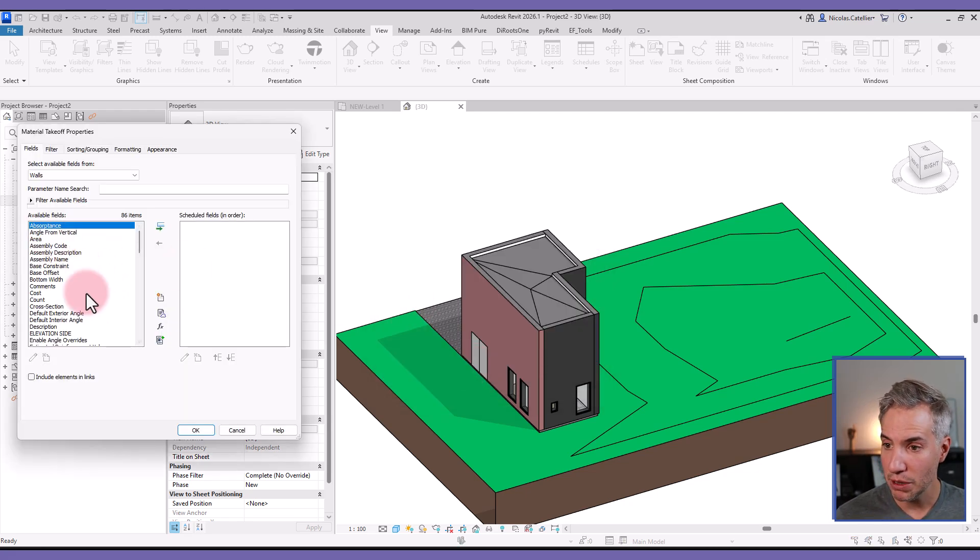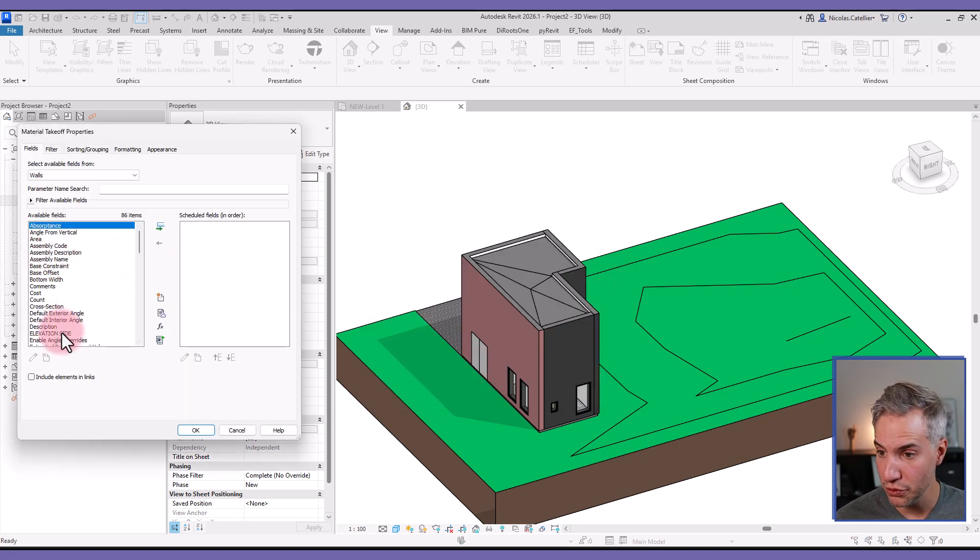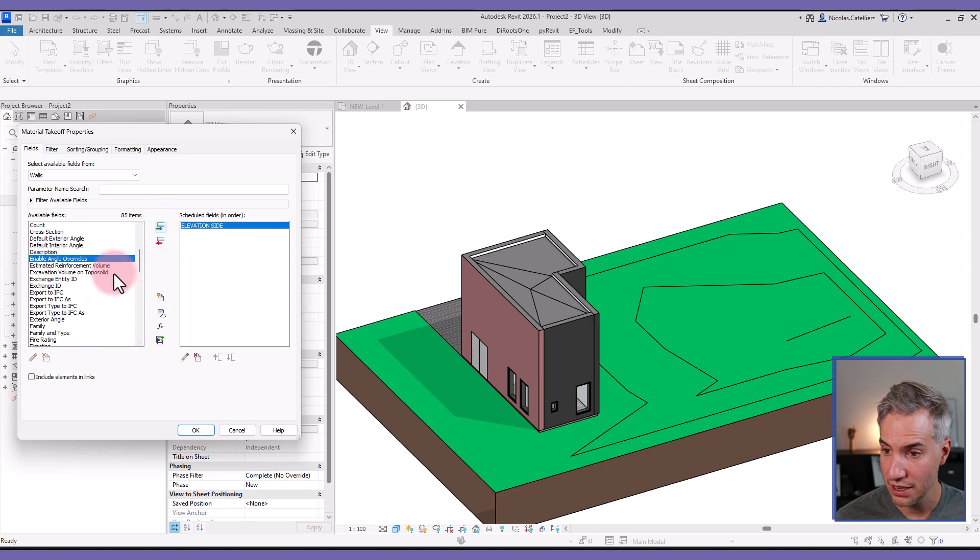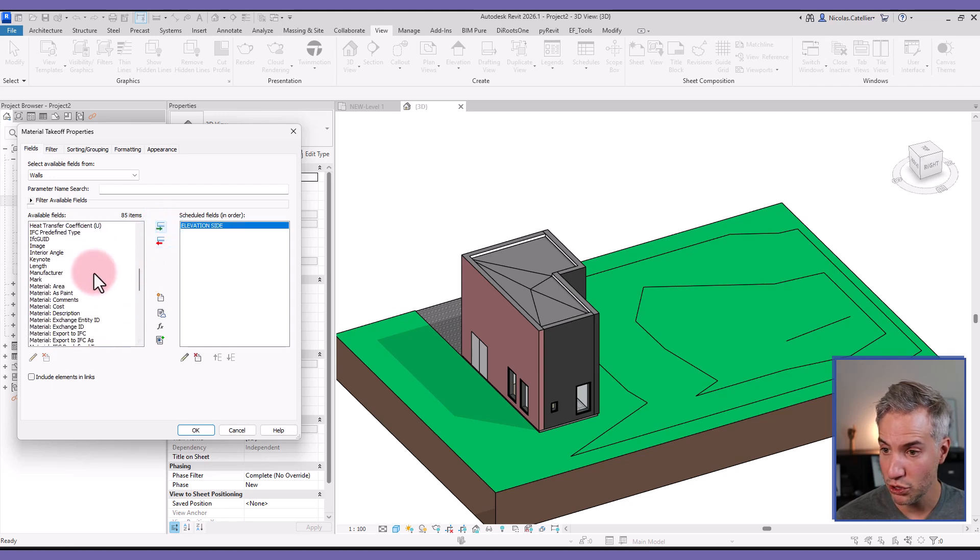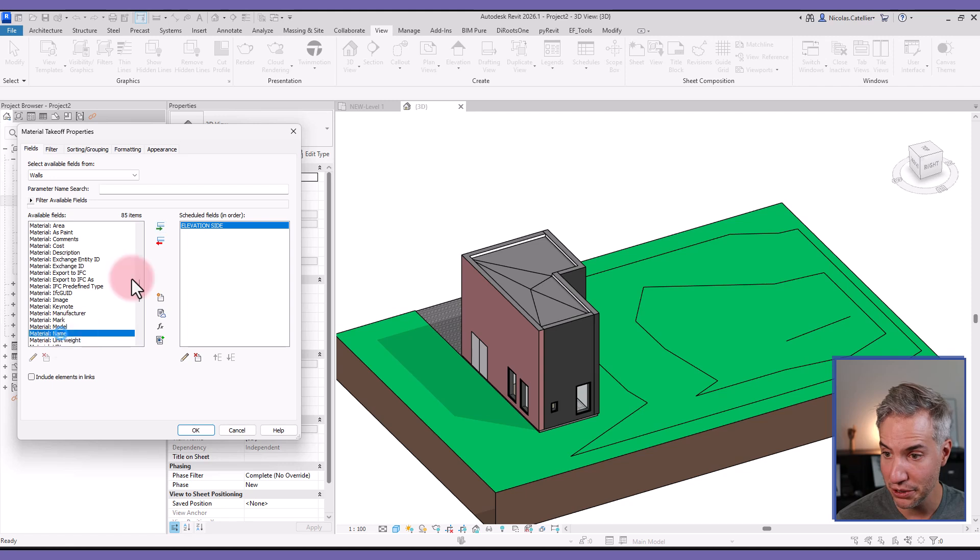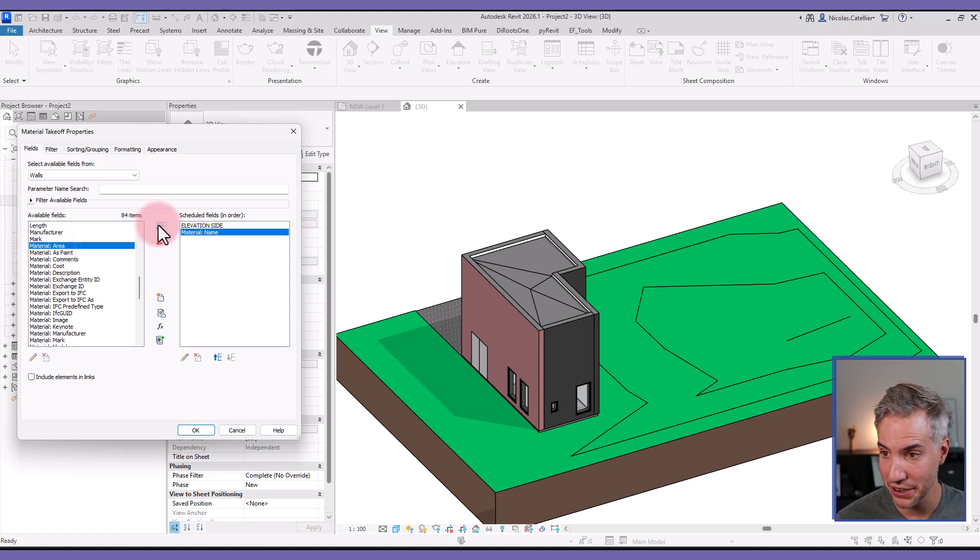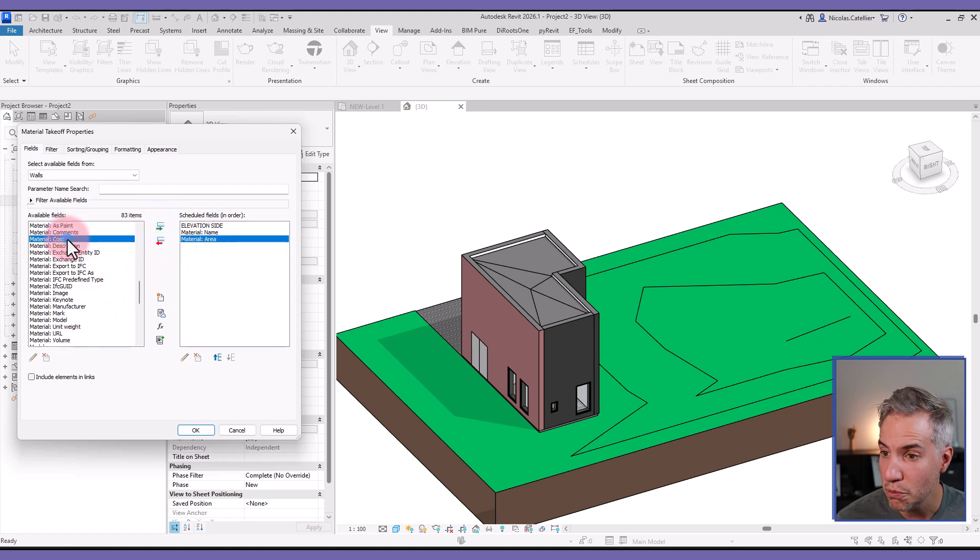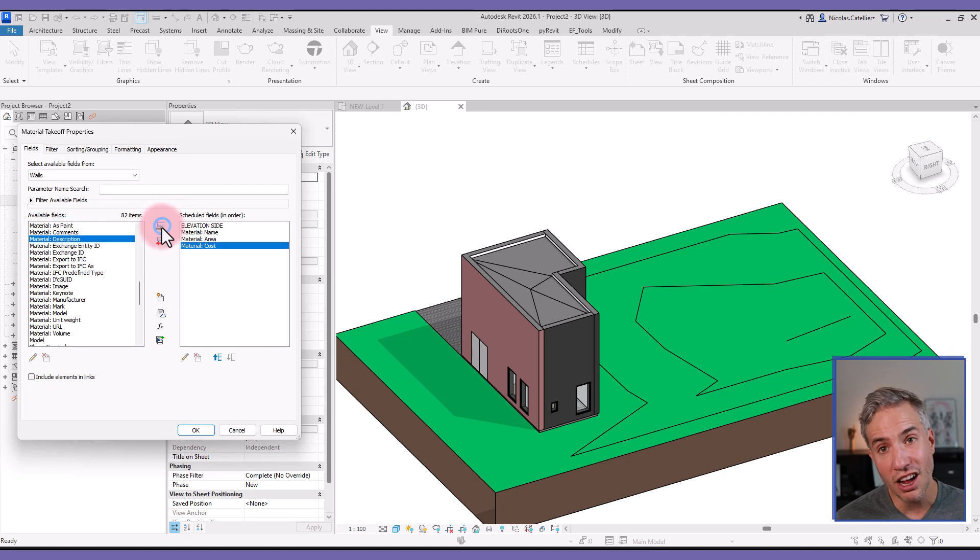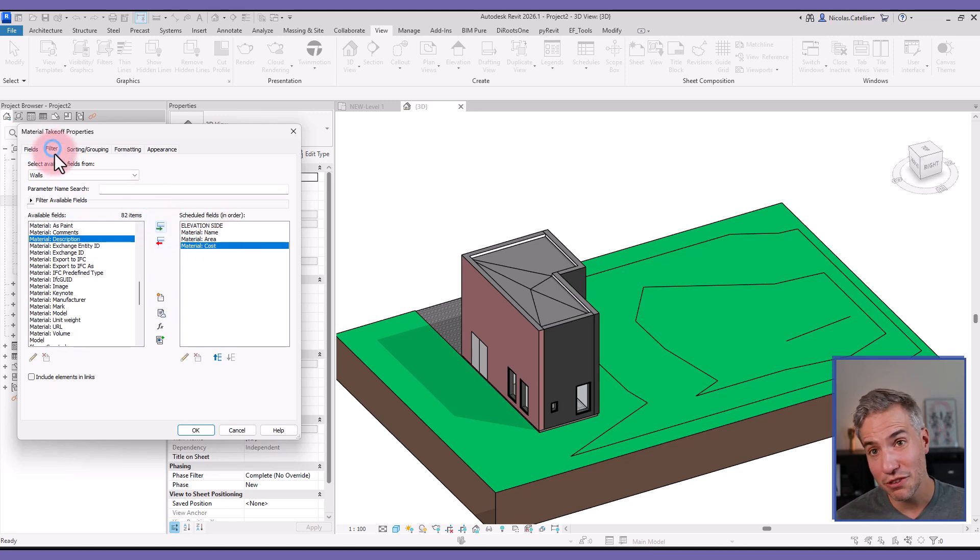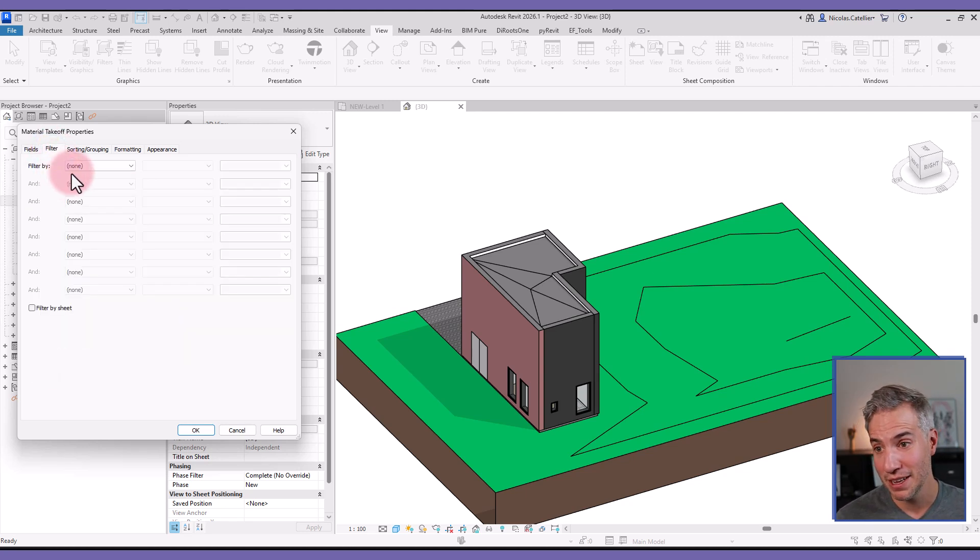Then I will bring some of my parameters. The first one is Elevation Side. Then I will scroll down to find the materials. I will bring Material Name, I will bring Material Area. I could also bring Material Cost if I want to do some cost estimation. Then I will go to the Filter tab.